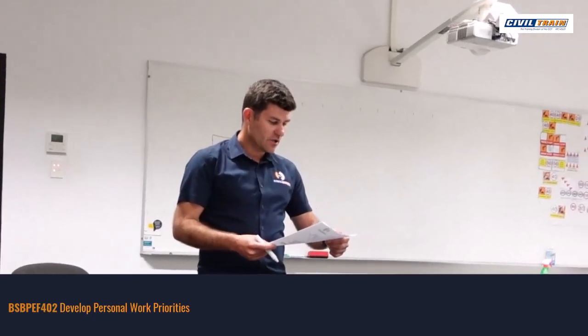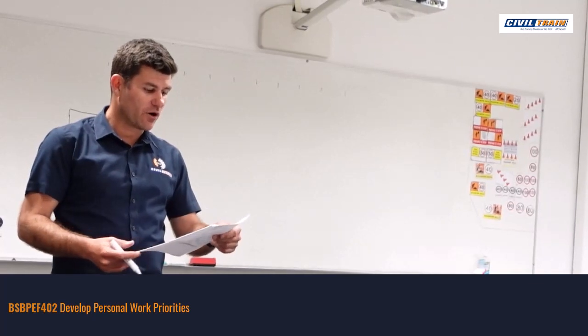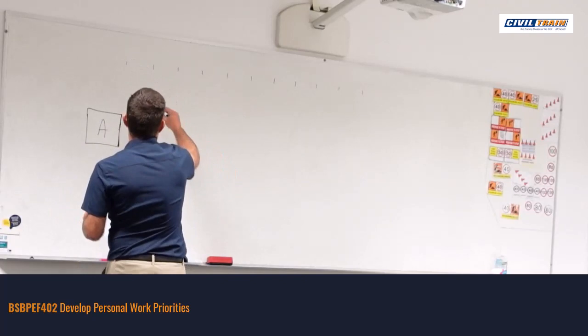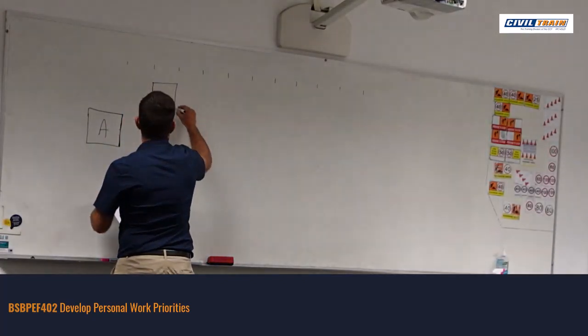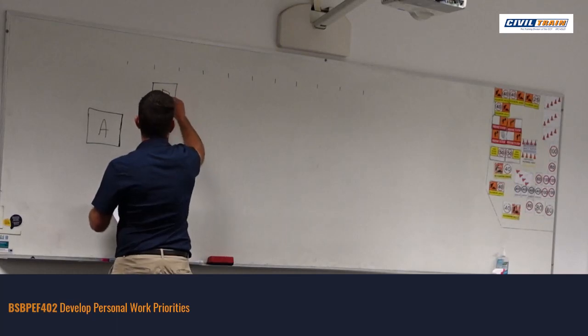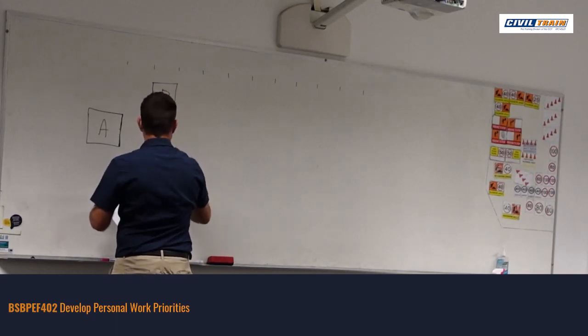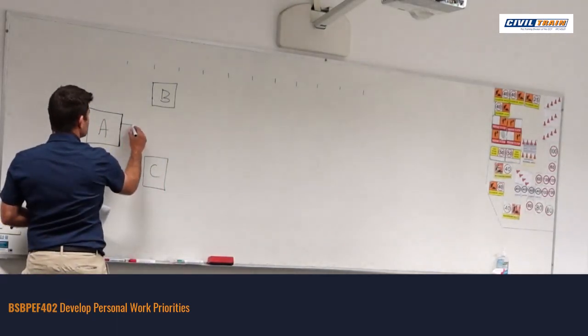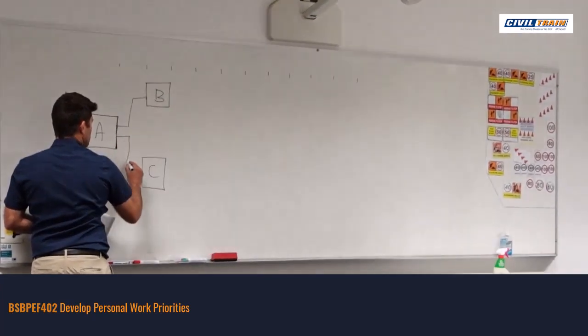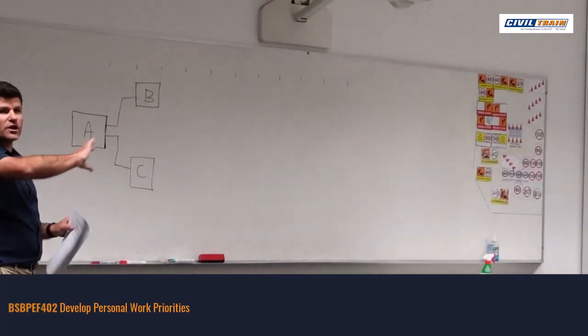So as we identified, by going through the information, we identified that A is the first activity. And then we've got to follow suit from that. So what I've identified there, we've got B and C follow A. I've got B and C follow A. And what I'm doing is drawing in dependency lines. I'm just working my way through.